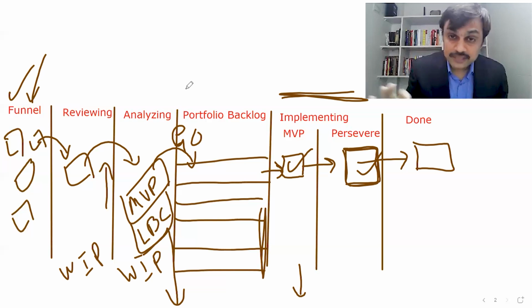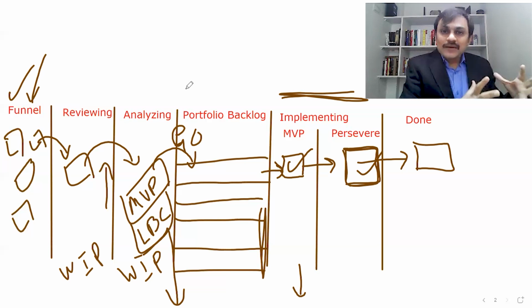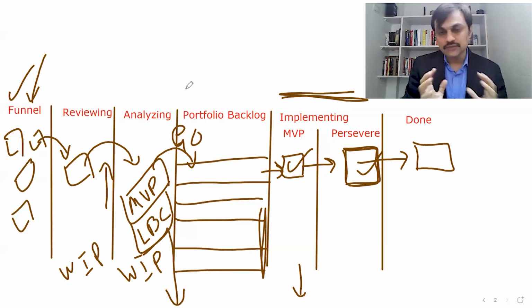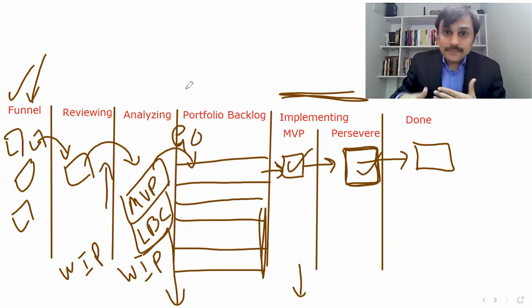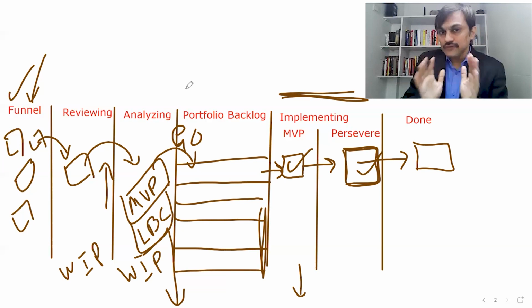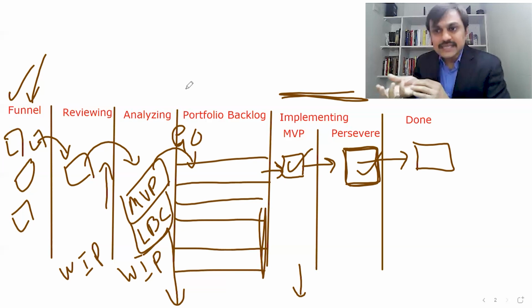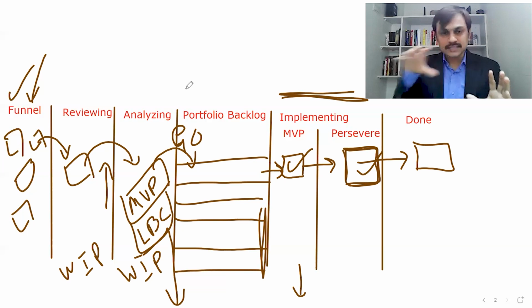And that is also a very big difference between the project way of working and the epic way of working. It's not like the requirements were given in the epic, and when all the requirements get over, then the epic gets over. It would not be fair to assume that. We can say the business initiative goals were given in the epic. Those goals and initiatives incrementally got explored with the help of features. And when we realize we are good with what we have achieved, or there is no use of pursuing this goal further because of whatever reason, or we have achieved enough, we move that particular epic into done and we release that capacity so that a new initiative can come in. So this is how the whole process keeps going.